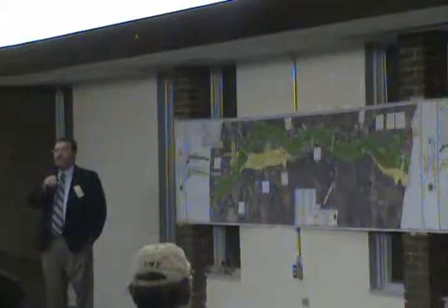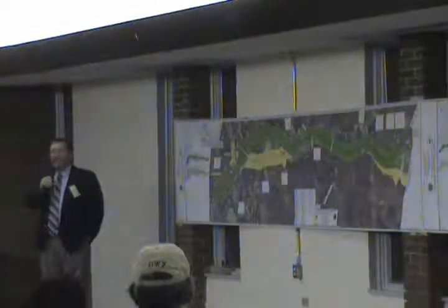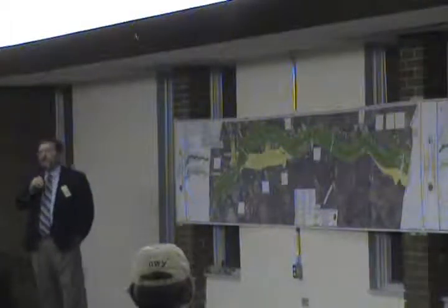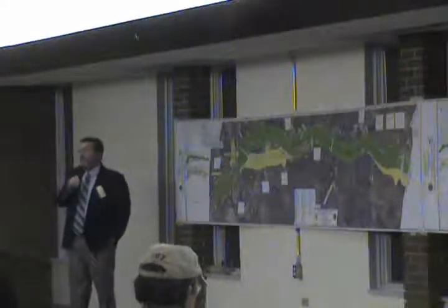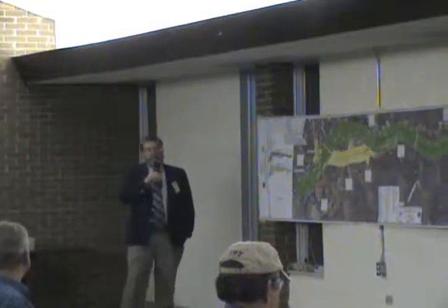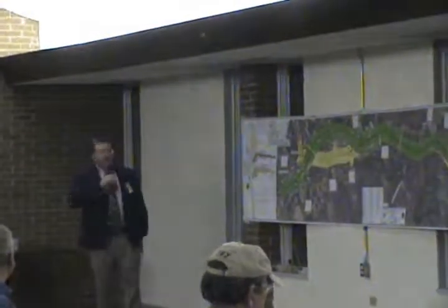So let's talk about some of the colors other than the big yellow and green bands. Let's go ahead and talk about those first. Now, the width of the yellow and the green bands, those are 1,000-foot wide planting corridors. That is not the footprint of the project. That is not the impact area of the project. That's just a planting corridor that allows us to wiggle the alignment in there without having to go back out. It's a requirement that we have to do as part of our project development process.